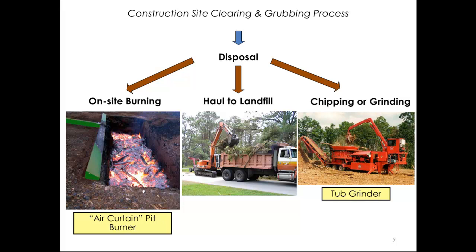The last option, in the center, is hauling the material off-site to an approved landfill. The downside of this option is the considerable cost of loading and trimming each truckload, hauling it to the landfill location, and then paying a tipping fee to dump the material. Okay, let's wrap this up by looking at a few issues that project management would normally be concerned with.